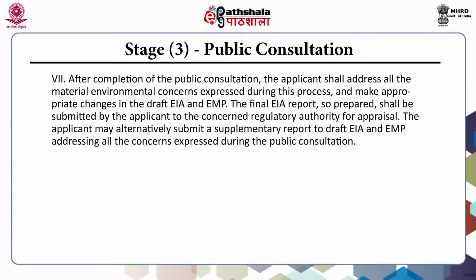The final EIA report so prepared shall be submitted by the applicant to the concerned regulatory authority for appraisal. As per notification, the applicant may alternatively submit a supplementary report to draft EIA and EMP addressing all the concerns expressed during the public consultation.